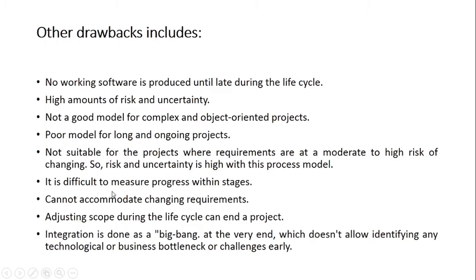It is difficult to measure progress within the stages. In a stage itself, what does it mean? Once a phase is completed, you carry out a review, that is verification. You get a document, so you can tell the progress. But within a phase, say you are giving designing as a 1 month activity, at 15 days, can we tell how much of the design is completed? No. Software doesn't have any look and feel unless you get the entire software or any deliverable at an intermediate step. So it is very difficult to tell how many activities within a phase are being carried out and how many are left.